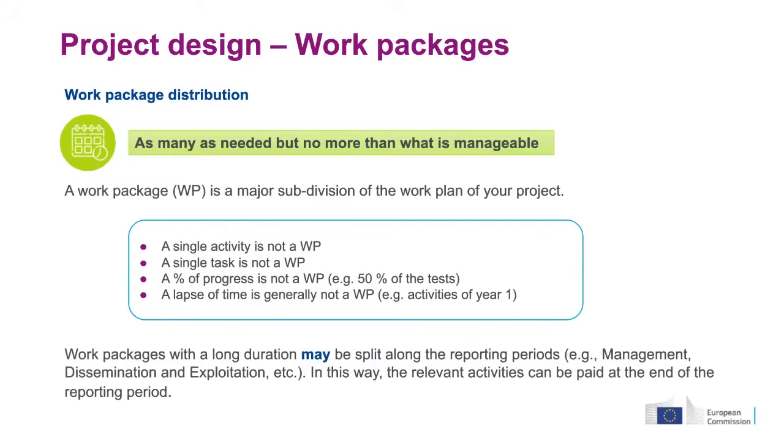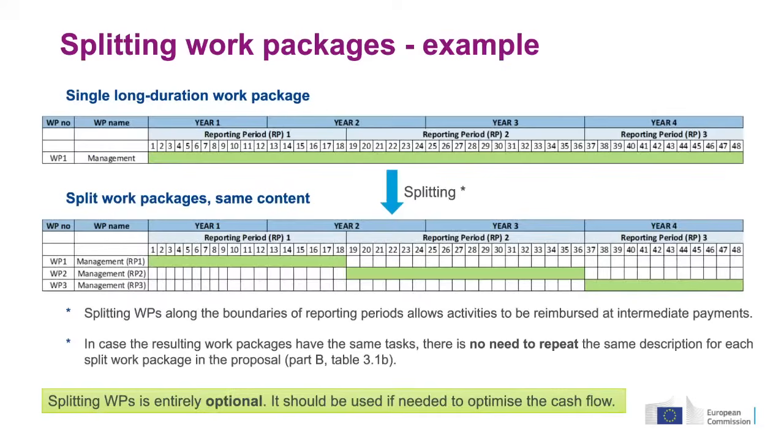Therefore, in order to avoid cash flow problems, you may split work packages along the lines of your reporting periods. Now, I really have to emphasize this is an option, and the sole purpose of that is to avoid problems with cash flow, nothing else. There's really no other justification than that you have problems with cash flow and that you need to be paid at certain moments for the work that has already been done.